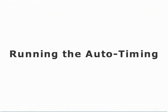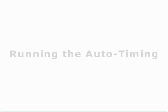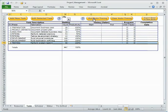Running the auto-timing. Once tasks have been added, the auto-timing function can be run to automatically calculate the optimal start and end dates for each task by evaluating the available human resources and respective productivity factors.